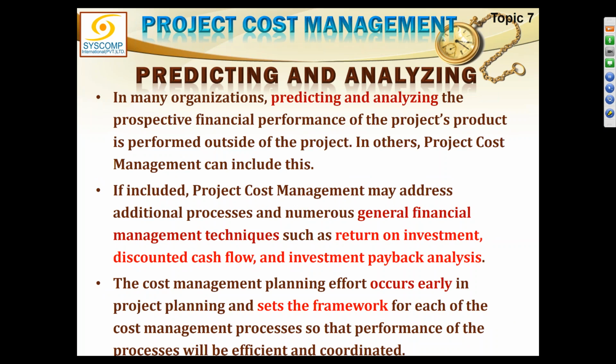Predicting and analyzing: in many organizations, predicting and analyzing the prospective financial performance of the project's product is performed outside of the project. In others, project cost management can include this. What do you mean? That exactly what I mentioned is talking about the feasibility study. Those feasibility studies, prediction and analysis should be done before the project, not as a part of the project in most cases. But in some projects, feasibility could be a part of the project as a phase, as a sub-project or something like that. But generally speaking, the feasibilities, the predictions and analysis, how you expect things to go on, should all be done beforehand, before the approval of the project.